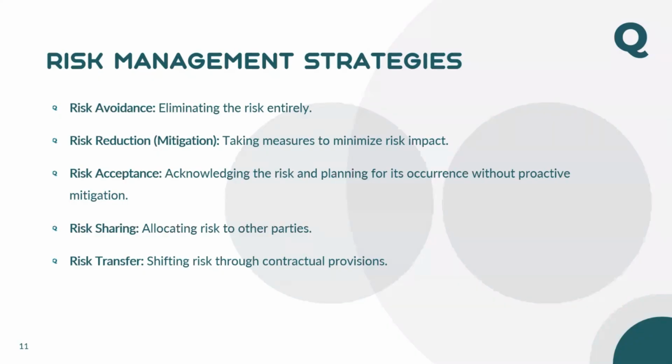So first, risk avoidance. What you can do is say, dear employer, there is no advance payment provision, and that is going to hit my cash flow. I would appreciate it if you give me an advance payment. So the first thing is that you have to request for that.